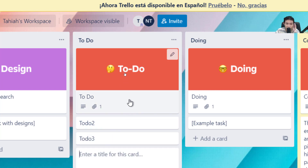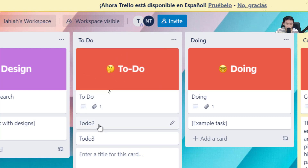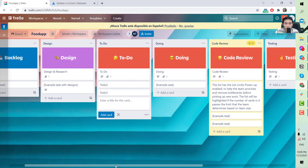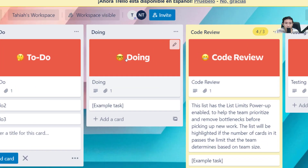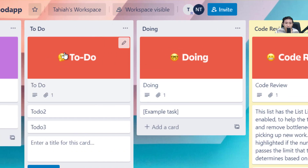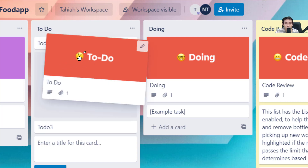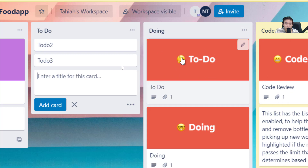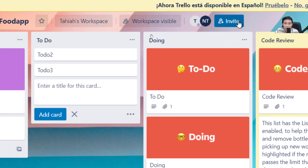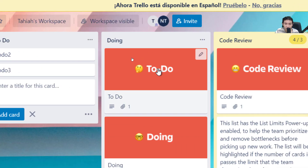For example, if To-Do 1 is positioned above To-Do 2 and To-Do 3, the developer will know that To-Do 1 is more urgent and higher priority than the rest. For the Doing column, when a developer decides to work on a card, they move it from To-Do to Doing to let the team know they are working on that ticket.